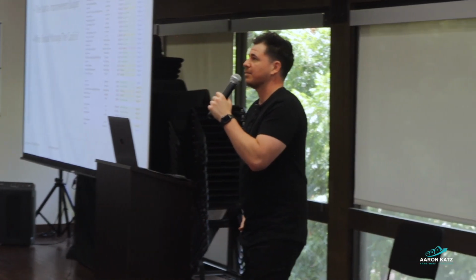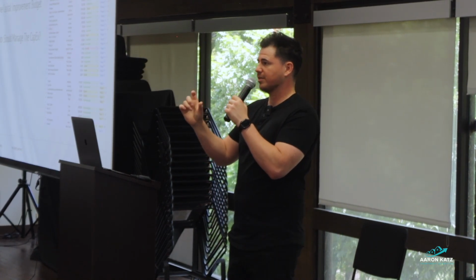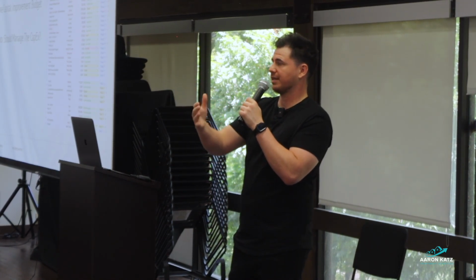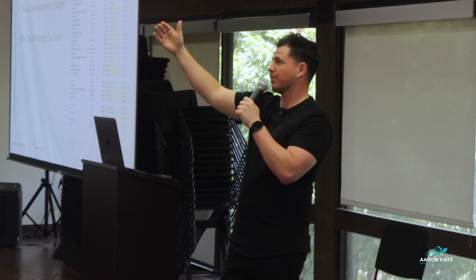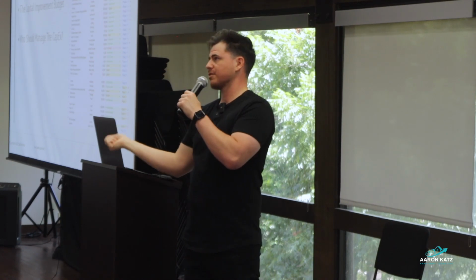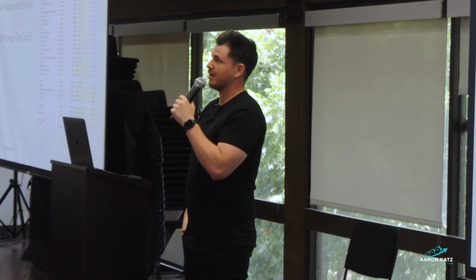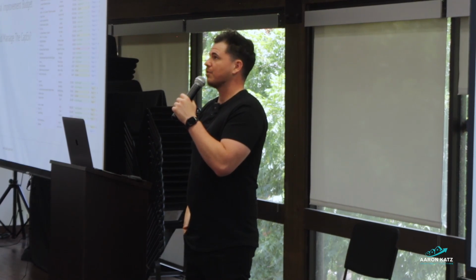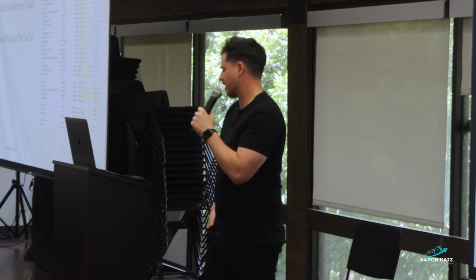I'd say the biggest thing about the budget is, know that you can play with it a little bit. If you're dealing with a lender, like if you didn't raise the money for the CapEx and the lender has your CapEx budget, it's not as easy as, oh, okay, we were wrong about the roofs by $500,000, we can just reallocate funds from somewhere else. A lot of times they won't let you do that, and then you get in a bind. So the capital improvement budget is one of the most important aspects of CapEx.